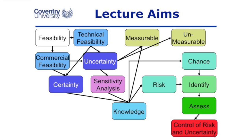We're trying to determine what risk is, and we often get into trouble thinking about uncertainty. We start off with the feasibility of the project — the technical feasibility and the commercial feasibility. Some things are certain, like the laws of physics or the purchase price of something, and some things will be uncertain and we don't really know about them. It might be that we can do some sensitivity analysis or some measurements to try and gain some knowledge about these uncertain things. When we have this knowledge, we can actually treat this as a risk because, having identified it, we can assess it — it's measurable in some way — and we can manage that risk or uncertainty.